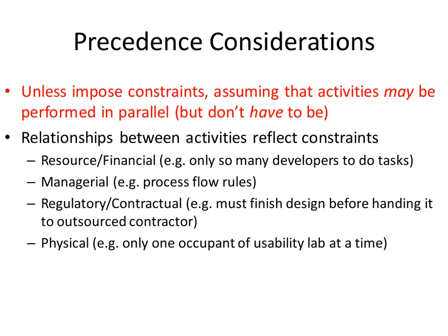In other cases, these dependencies can be managerial. They can be based on regulatory rules. You cannot put your system into operation until it's gone through a set of validation or acceptance tests. For certain subdomains of IT in which I've worked before, such as pharmaceutical companies, there's a very rigid process of gating phases, and you're simply not allowed to put a system into use until it's gone through certain gating phases. So it's perfectly ready from an informational standpoint, it's all there.